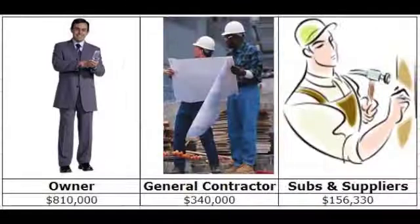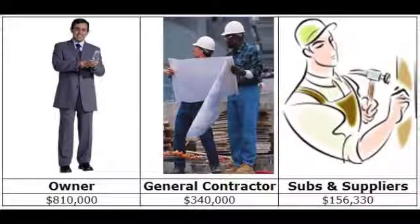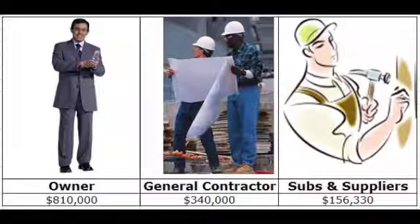In the third month, the contractor has earned $425,000. The owner will then retain 20% and pay the contractor $340,000. After the contractor has received this money and waits 7 to 14 days, he will then pay his subcontractors $172,000, minus 10% retainage, for $156,330.